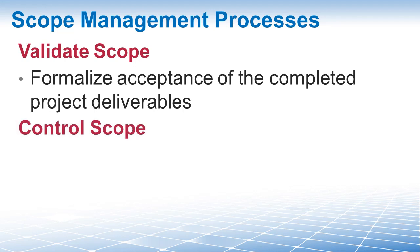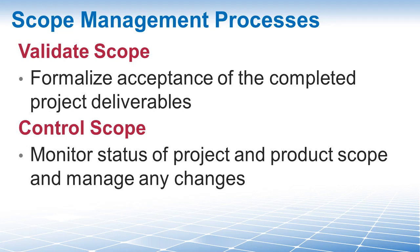And finally, Control Scope — the process of monitoring the status of the project and product scope and managing changes to the scope baseline. Scope creep happens when you have uncontrolled changes that can wreak havoc on an otherwise well-planned project. Your scope baseline provides a tool to compare actual results and determine if preventative or corrective action is needed. Control scope includes analyzing scope performance, reviewing change requests according to the perform integrated change control process, and updating the project management plan and other project documents. In other words, control scope helps you manage the processes you're utilizing to keep the project running smoothly.